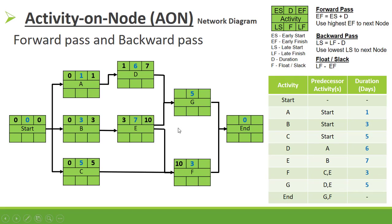For activity F, we have incoming early finishes of 10 and 5. In the forward pass we use the highest, which is 10: 10 + 3 = 13. For G, we have 7 and 10; the highest is 10: 10 + 5 = 15. At the End node, we have 15 and 13; the highest is 15: 15 + 0 = 15. The project duration is 15 days, the same as calculated in part 1 using the Activity on Arrow method.